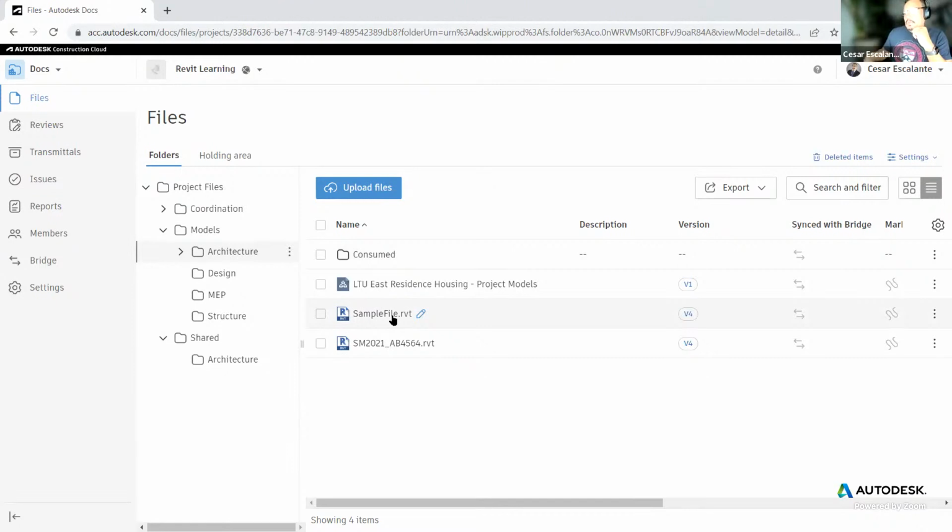When a file is published again to the portal, those markups are persistent regardless of the version of the model. If you're doing this structure QA, you can go back and review that the clouds have been taken care of. And then you, as the owner of the markup, can delete them.